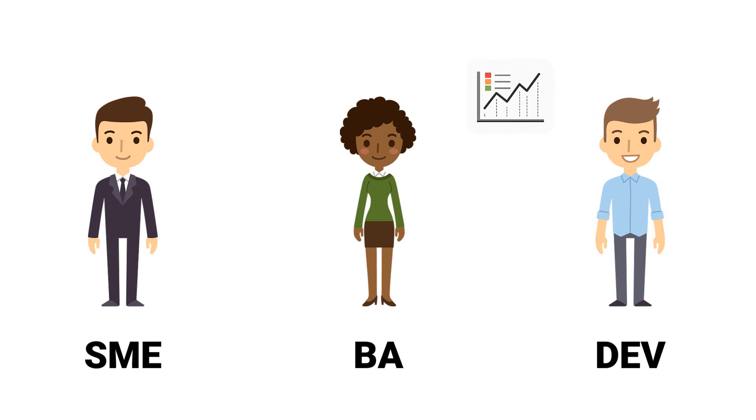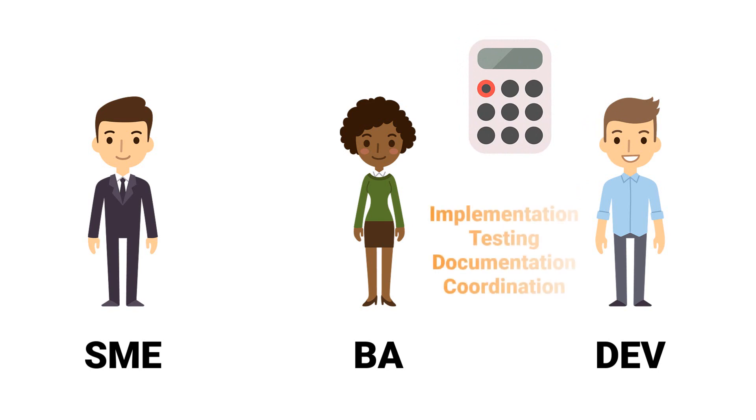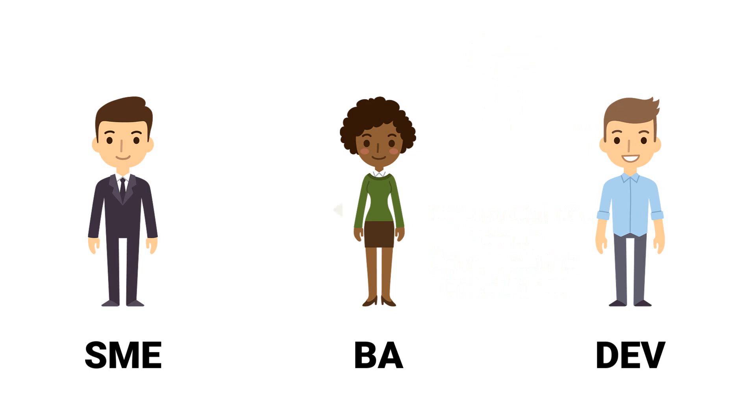After the effort estimate for the change has been created, the business analyst calculates the costs for the implementation of the change request, including testing, documentation, and coordination. The business analyst forwards the costs to the department, how much the change request will cost.